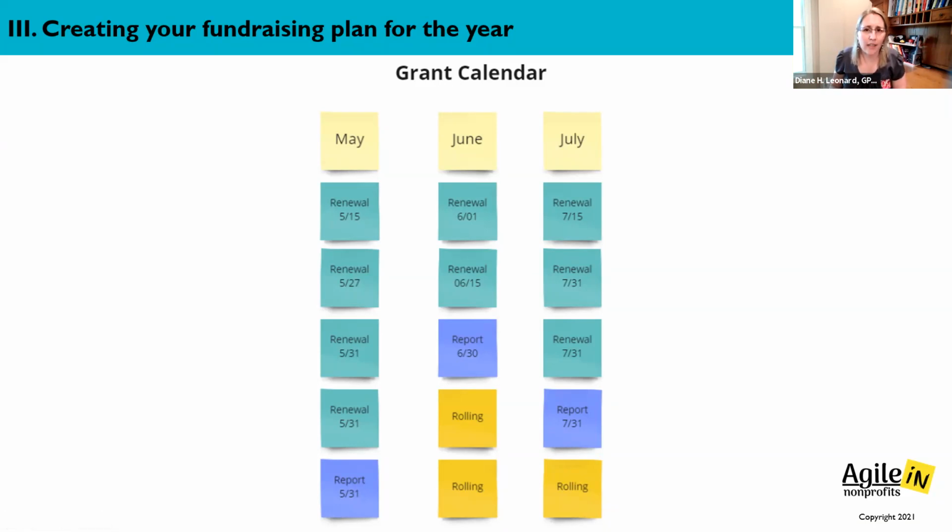Geez, it looks like, pick a month. Let's say it's April. Looks like April is really, really, wow, it's heavy for our team. Team, let's step back. Do we understand our priorities for these items that are related to April? What would we say is our lowest priority? What brings about the least mission value? Sometimes it's hard to pick the number one thing. So sometimes it's easiest to decide what is the lowest priority. Can we stop doing it?